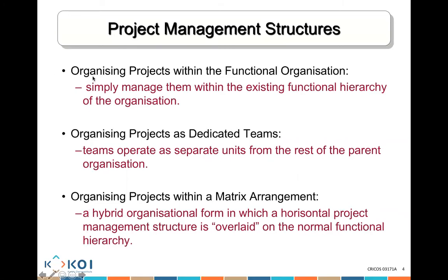So the person in charge in a strong matrix is actually the project manager. So there is a project manager for that matrix team. But if it's a weak matrix, the functional manager is the one who's really in charge and calls the shots when it comes to when their team member is going to be able to do project work for that specific team that is part of the matrix arrangement.